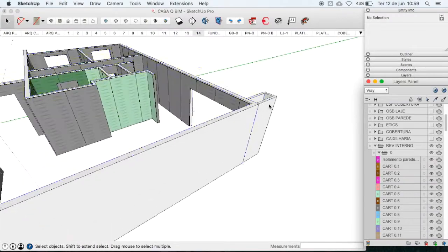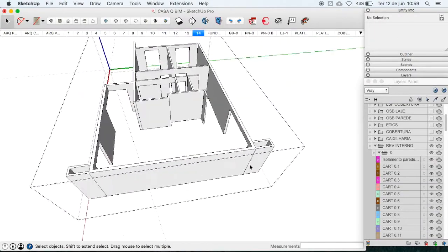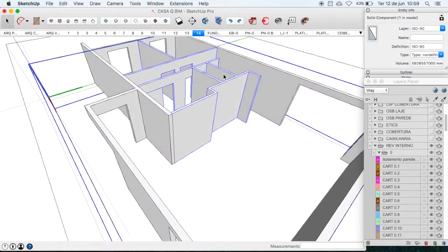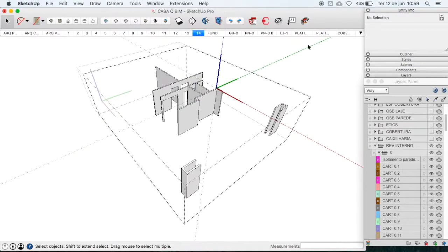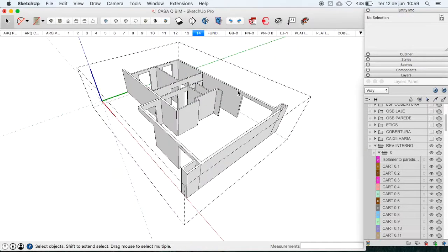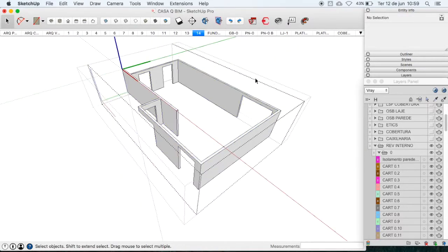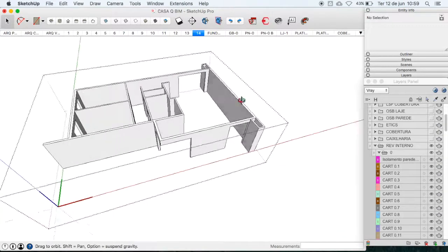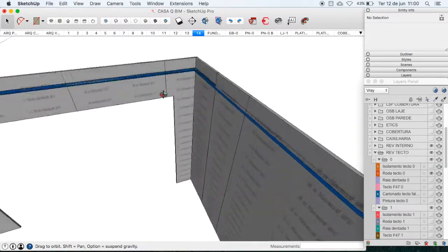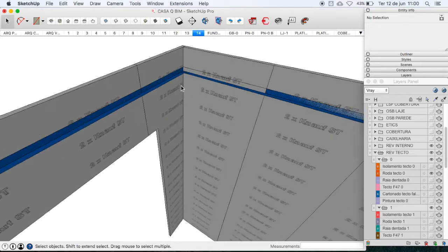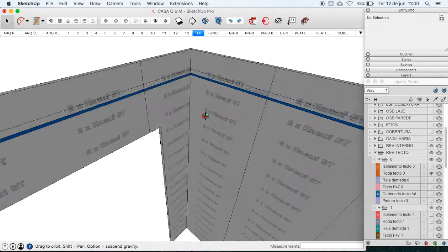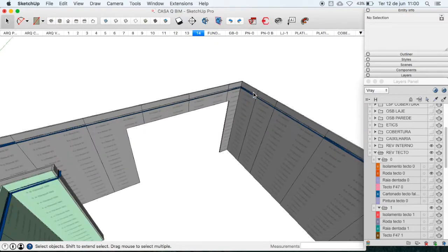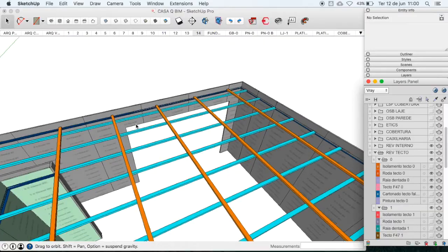The thermal insulation material of the walls was divided in two objects, internal walls and external walls, because they have different material consumption per square meter. In the ceiling structure of this model, the contractor requests the individual quantity of each type of profile.